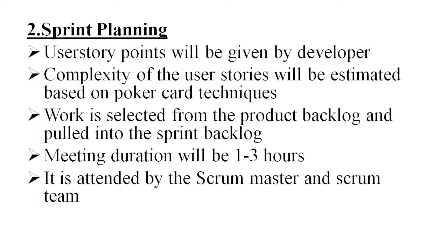Okay, so next one, sprint planning. In sprint planning, user story points will be given by the developer. The complexity of the user stories will be estimated based on poker card techniques. Depending on the Fibonacci series, we give points to that user story.